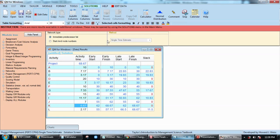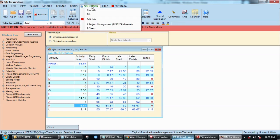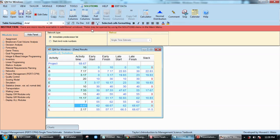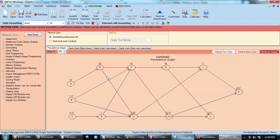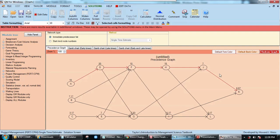If you want to check or to see the graph or the critical path, then just click on solutions, then select charts. Here this is going to be the critical path: A, D, F, H, J, K. And that's it.